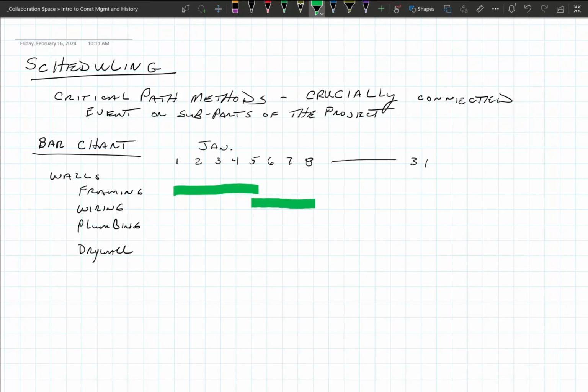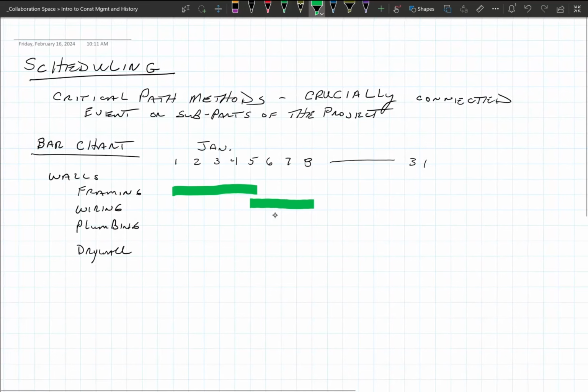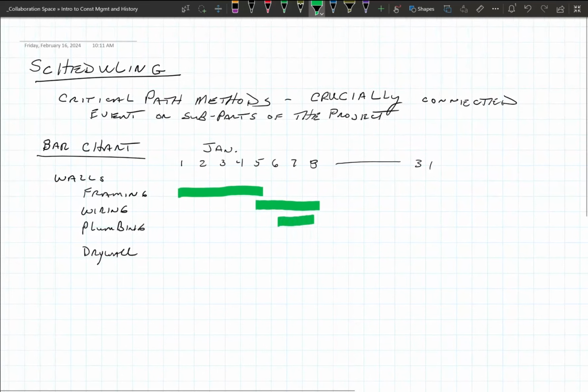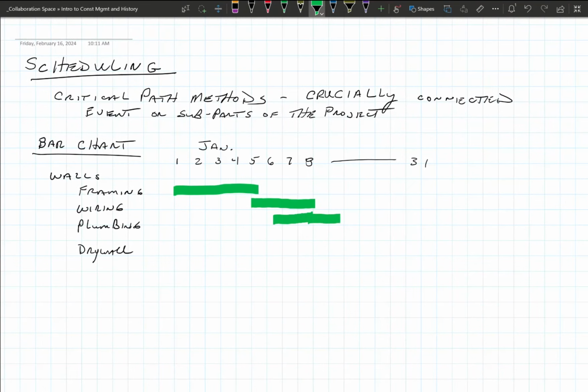All right. So you said 5 days, right? Or 3 days, but we'll do 5. So what if we start you and go there? Okay. Then we got drywall. Drywall can't start until everybody's done in there. But here's another little thing we can put in the schedule that I didn't do.